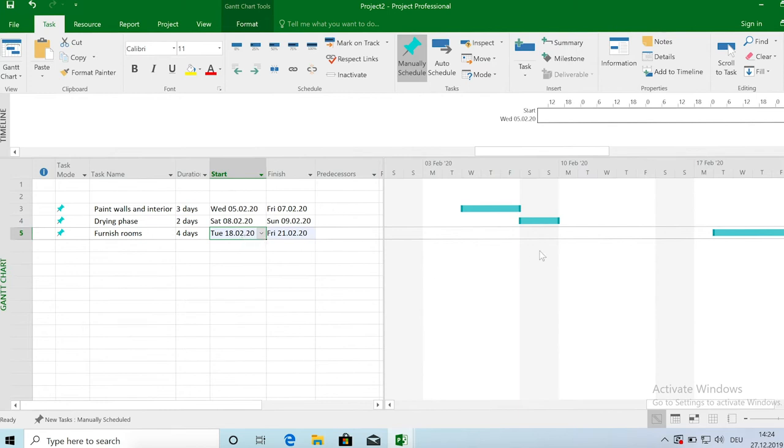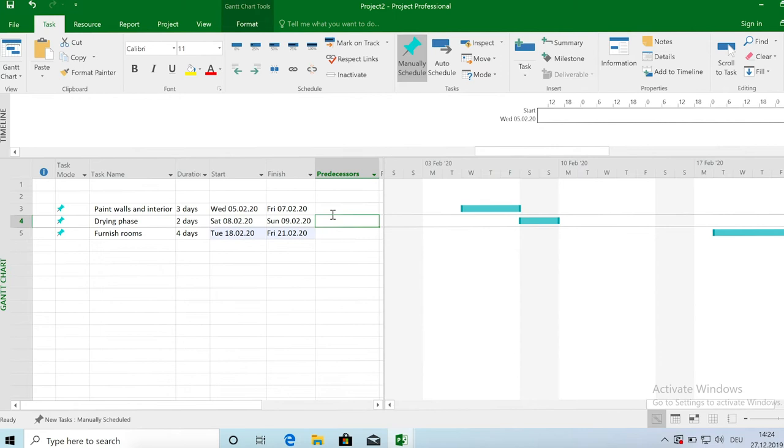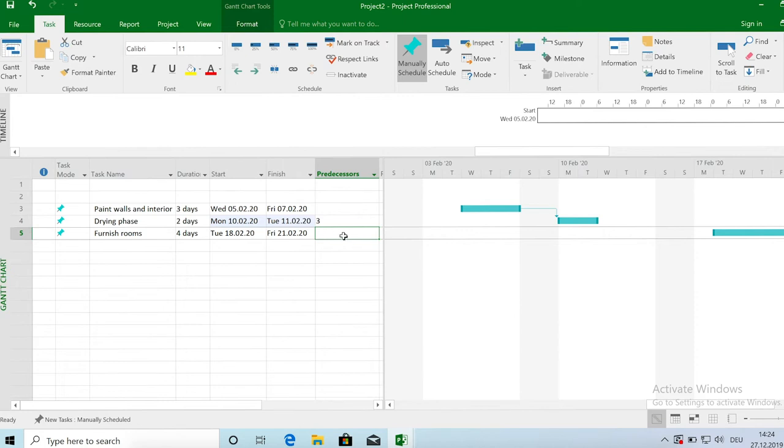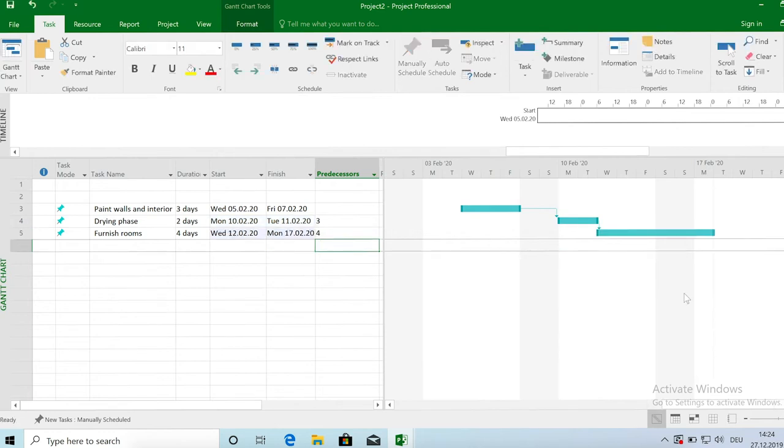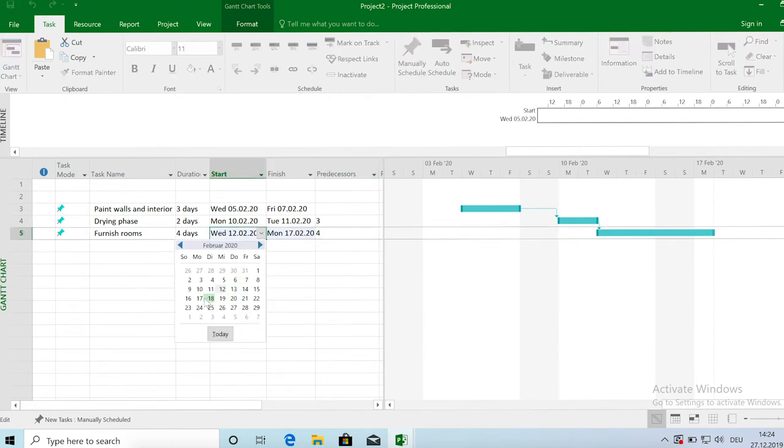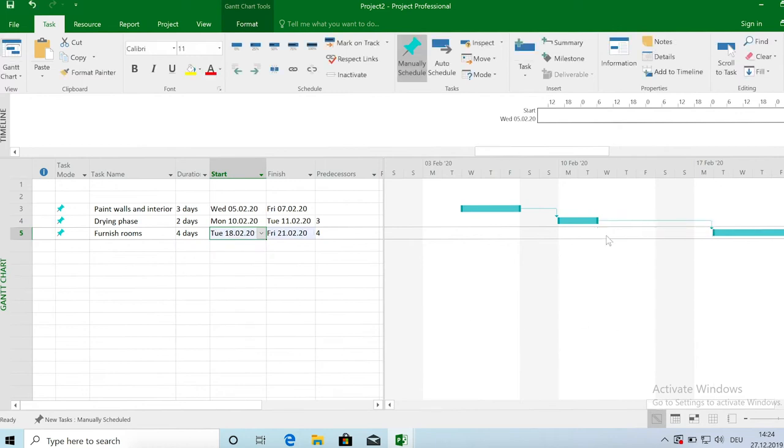So you have complete flexibility. What we still can do even in the manual mode is to link up those tasks. So meaning to track or to enter the dependencies. So the drying phase, let's start with the middle one. The predecessor of the drying phase is task number three, so the painting. And the predecessor of the furnishing task is the drying phase because we can only start setting up the furniture once the walls have dried and the floors dried. So this is task number four. And now you can see these arrows being put here between the tasks.